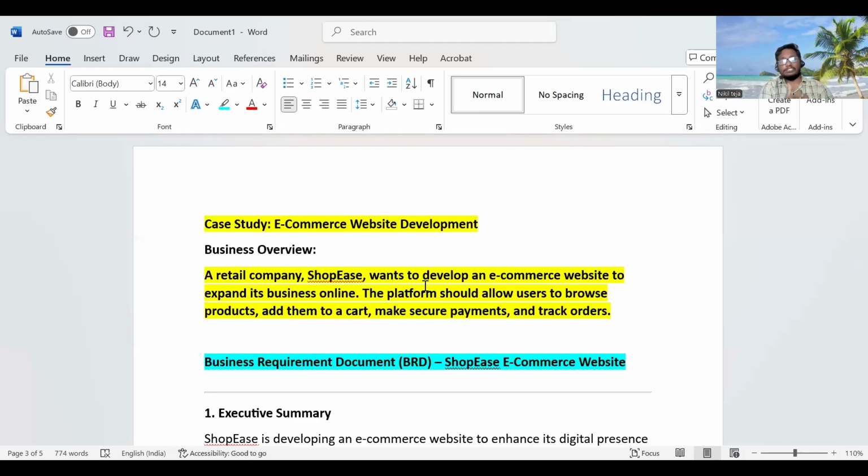You will make another BRD where you copy the points of this BRD and update some changes in it. So this will be version 1.0 and the BRD with the updates will be version 1.1, but you will not edit this particular BRD. You will not edit the previous BRDs, but instead create new versions: version 1.0, version 1.1, version 1.2.